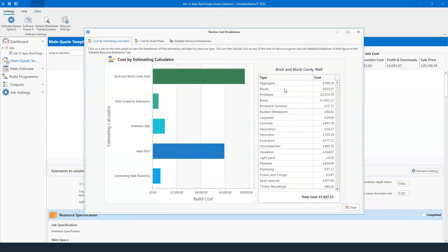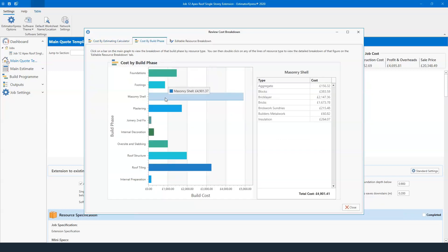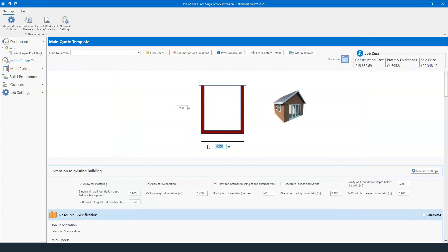Clicking cost breakdown shows everything broken down — so brick and block cavity into aggregate, blocks, brick glazes, bricks, brickwork sundries, and so on — all the way down to 7,627 pounds and 21 pence. I can break it down by build phase: clicking masonry shell tells me what I'm spending on aggregate, blocks, brick glazes, bricks, brickwork sundries, builders' metalwork, and insulation — up to 4,901 pounds. If I want to change any dimensions, I just click 'Change', enter six meters, and the price in the top right updates. Making it 14 meters gives us 20,574 pounds.